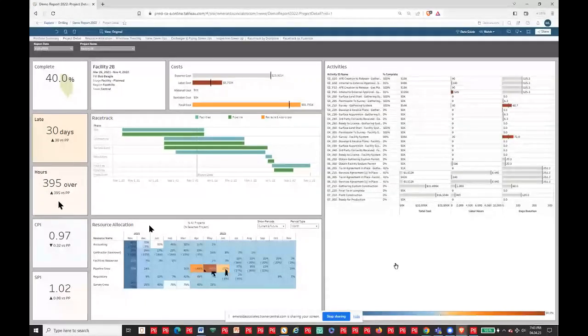And you can see in the bottom here that I've got some areas that, yeah, I'm going to have a look at, because in this May timeframe, what this is telling me is that I'm at 247% of my limit I have available for a pipeline crew. Well, I know that's not going to fly. I need to do something about it, or I'm going to have a major problem. So this is how you can very, very easily focus in on those particular pieces.